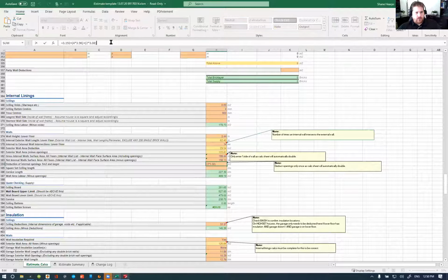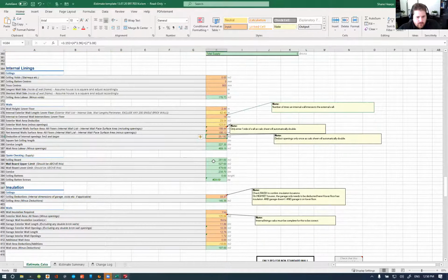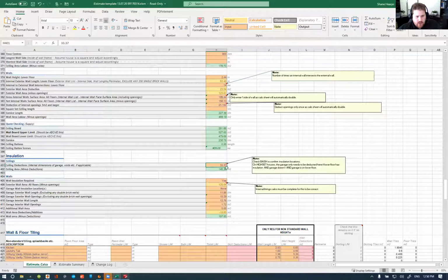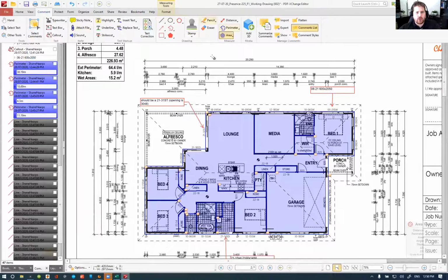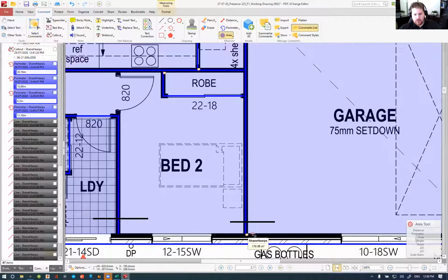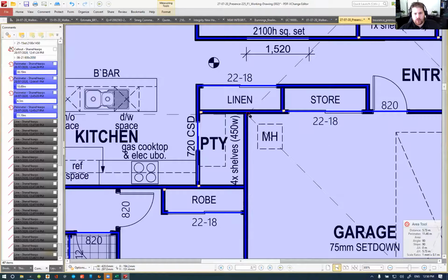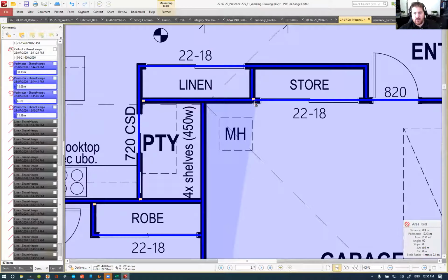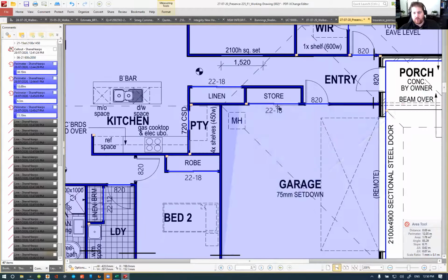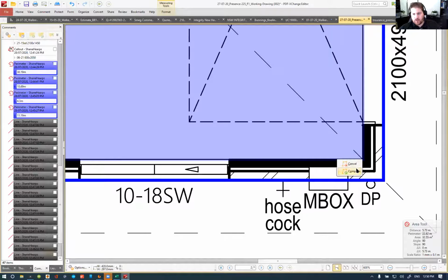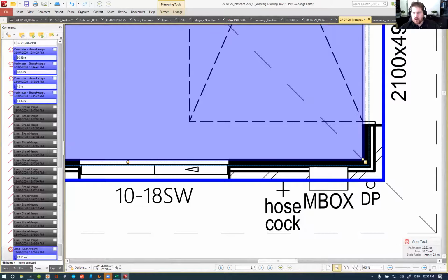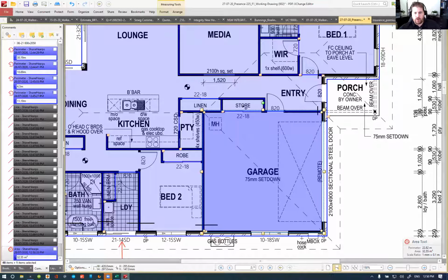Now this here's obviously looking at some other cells I'll check on in a moment. Ceiling deductions. Now the internal side of the garage is 33.37 according to this, which looks like it might be about right. We don't want to do the overall area, we only want to do the inside area in this instance, because if we don't, we will end up double deducting the cavity. We've already deducted the cavity off the total area, so we don't want to do that. So I've got 32.55, assuming the insulation carries through on the store.